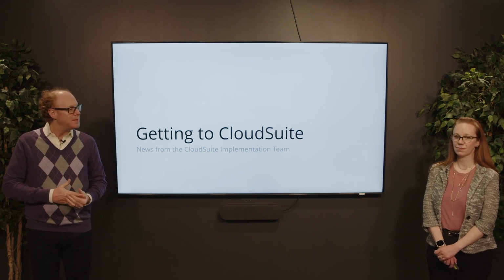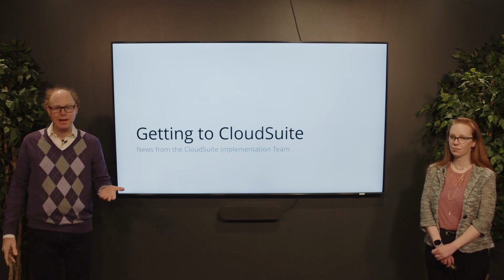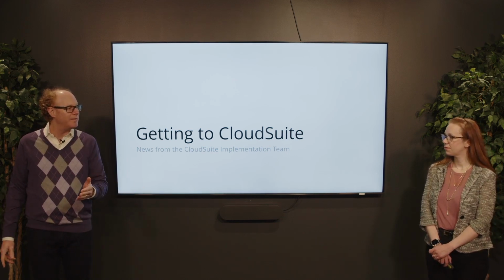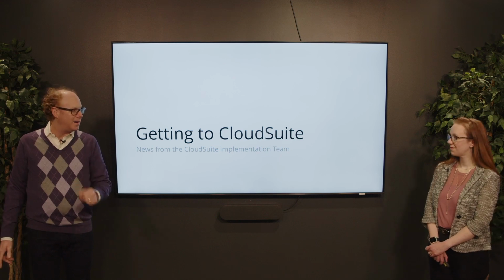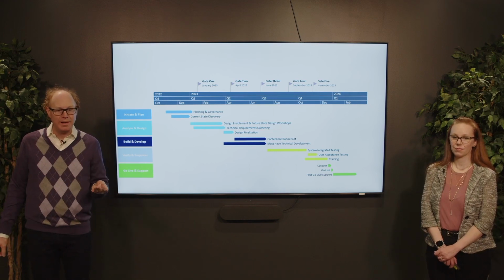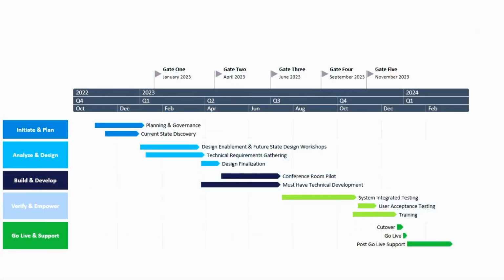A CloudSuite implementation can be a significant endeavor. Oftentimes these projects are a year or greater. Let's take a look at a sample timeline. Here we have an example of a CloudSuite implementation timeline. You can see it's a traditional waterfall approach to ERP implementation, since we do have a hard cutover at the end. You can see our 5 project phases here that are underpinned by a monitor and control phase throughout.